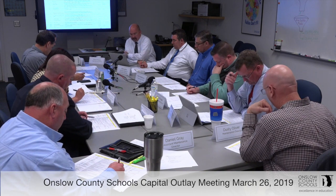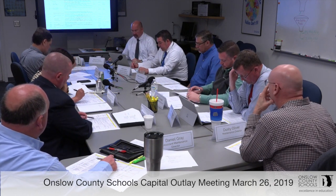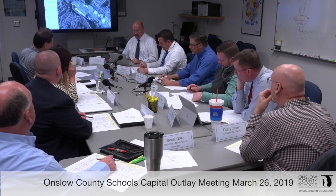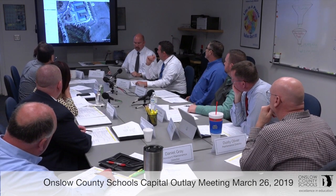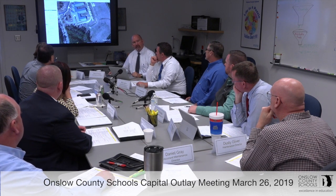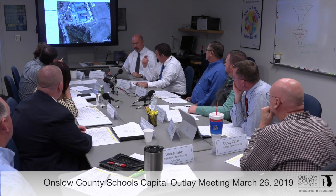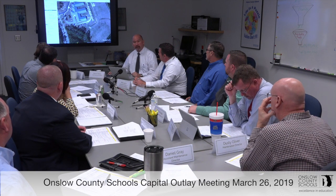All right. Paved staff gravel parking. The staff parking lot to the right of the building is gravel and poses a walking hazard for staff to and from. So just so you're aware of what we're looking at here, this was additional parking that was put in about 6 to 7 years ago. It takes a lot of site work and design work from engineers because we have some swales right in here. By paving this, they'll have to do the runoffs and build up too. I think what she's looking at is adding additional space right here for parking.